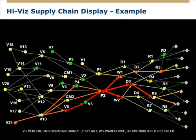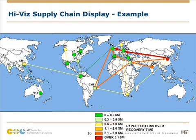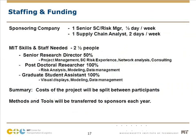This is the kind of picture we have in mind — and we want to be able to toggle from this over to a map-based display of the same thing. Sponsoring companies will need to provide supply chain analytical support and some senior management involvement. MIT will contribute a senior research director, graduate students, and postdocs. The costs will be split between the participating companies, and the methods and tools will be transferred to sponsors at the end of each year.